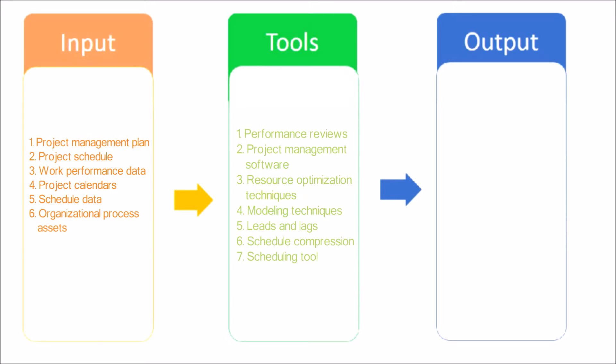Schedule Compression: Schedule Compression techniques are used to find ways to bring project activities that are behind into alignment with the plan by fast tracking or crashing the schedule for the remaining work. Scheduling Tool: Schedule data is updated and compiled into the schedule model to reflect actual progress of the project and remaining work to be completed.